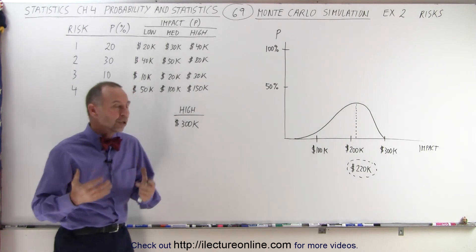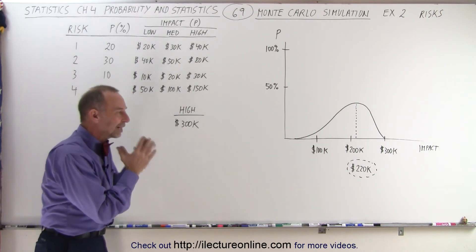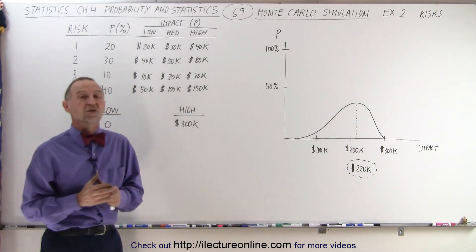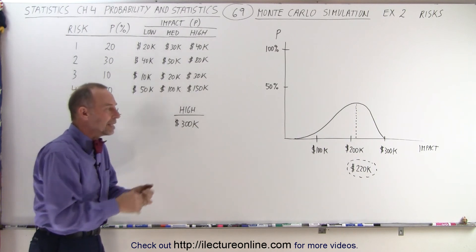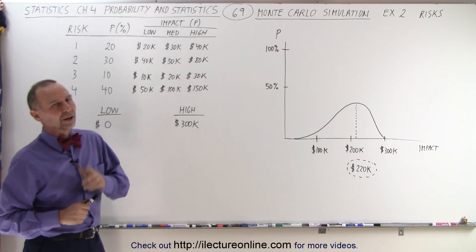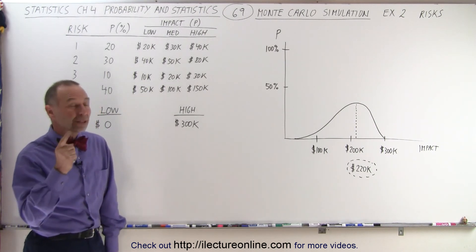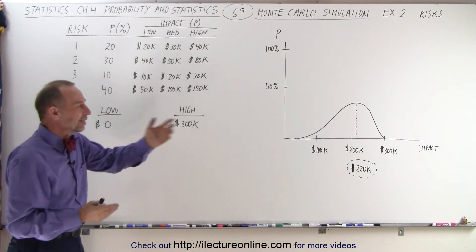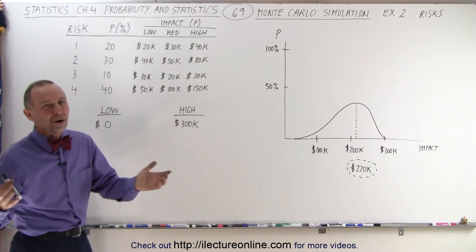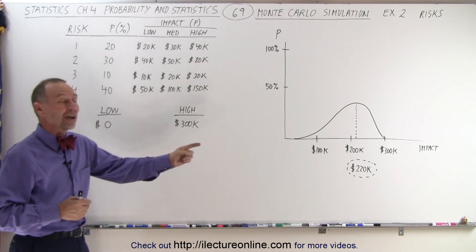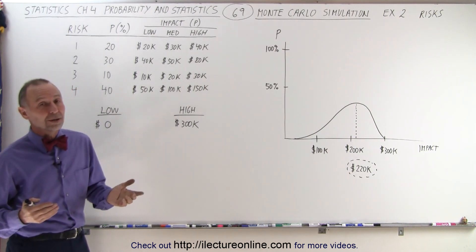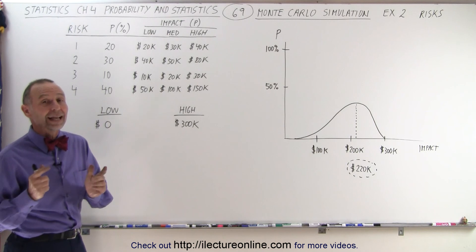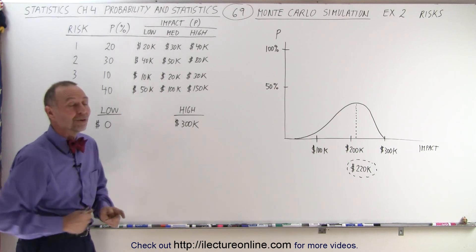So there again, it's a really good way to give you the most likely scenario of what's going to happen with the risks and how much cost is associated with those risks when the project is being executed. A good project manager would look at what could go wrong and account for additional costs if those risks materialize. And that is how it's done by using the Monte Carlo simulation.